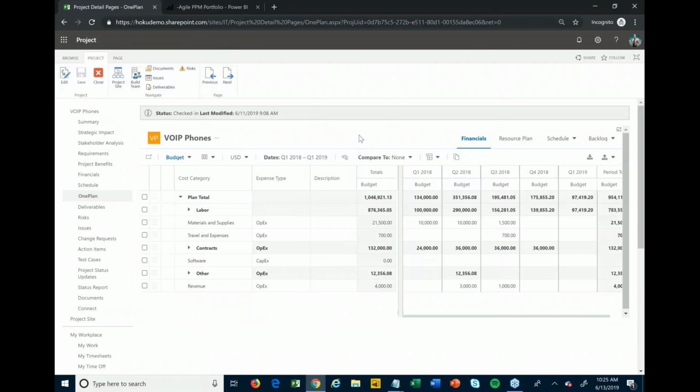What this provides is, if you have both Agile and waterfall projects, we might have a mixture of projects that we're going to eventually go execute on once they're approved. This provides a common way to identify what resources we're going to need and what financials we're going to need before we go and approve these projects to say, yes, go ahead and start doing it. Then when we start actually working on it later, once it's gone through the stage gate and/or approval workflow process that you set up and put in place here to put some governance around this, later on then might be when I start to go build out all of the actual details and then get into execution, more bottoms up side of things.